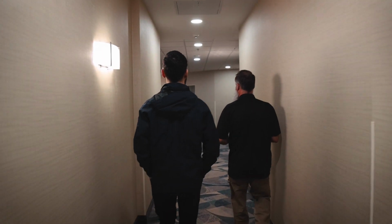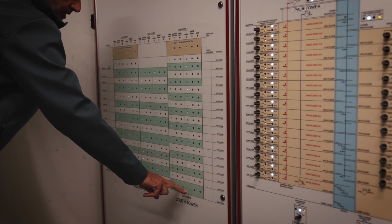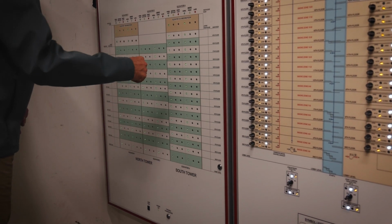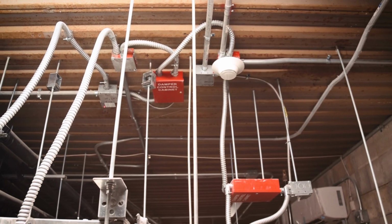Give them proper time. Say, hey, we're going to inspect, let's say, the third floor on the existing tower. This week we're going to be sounding off AVs throughout the building on the existing tower. So we had to coordinate with them, right? We had to do 10% testing every time we did an inspection on the new tower as well. So it was complex with that, even with the electrical contractor.